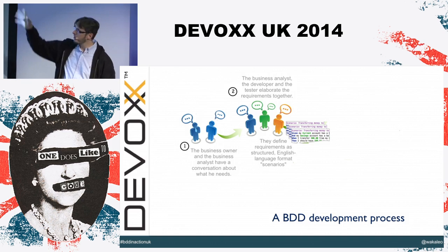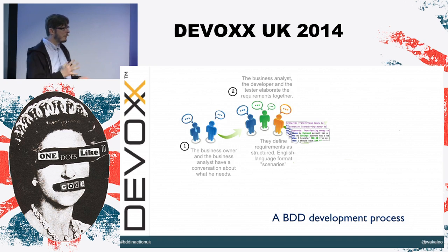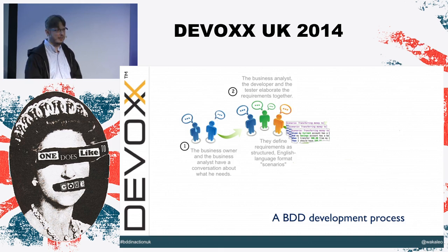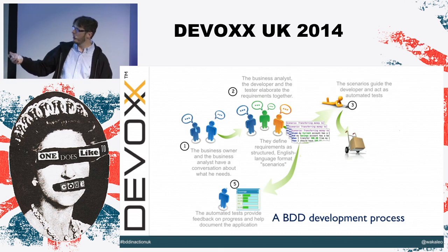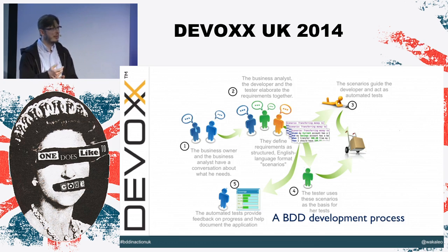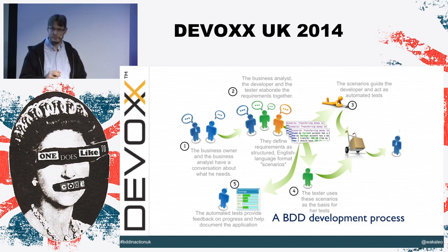And you'll also have a discussion between developers and testers about which aspects, which acceptance criteria can be tested automatically and which ones would be more subject to manual testing and what can be left for exploratory testing. So it's all about this collaboration idea. And from there, you get your code, you get living documentation. So living documentation tells you with very little doubt what's actually being built because it's depending on the automated acceptance tests, which tie back to the acceptance criteria. Do they work or don't they? You can't really have your 90% done.